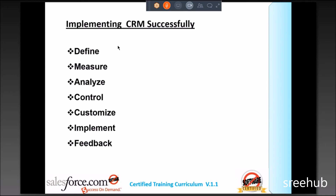All employees of Apollo around the world are now using the software you designed. All receptionists use the patient entry form, all doctors use the doctor form and fees form — everyone using their own solution built as per the business rules. There may be some feedback and issues coming up after go-live. Those issues are reported back to you. If it's not within the originally agreed scope, you inform the client: this is not in scope, and if they want it, a change request must be raised with additional charges.